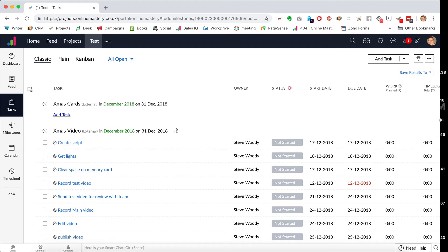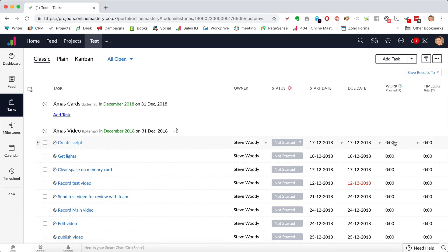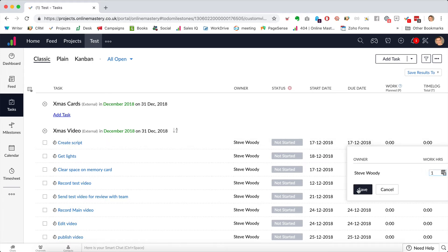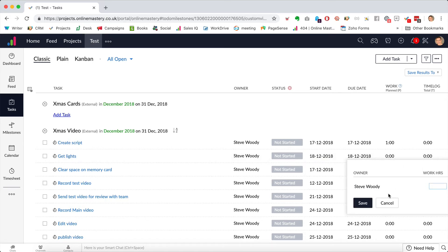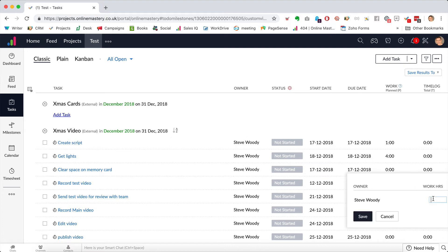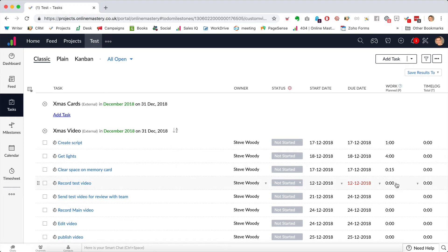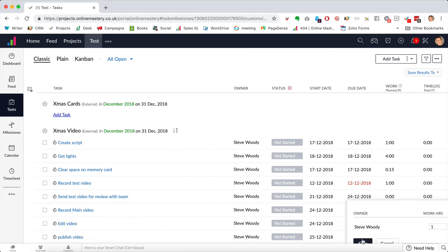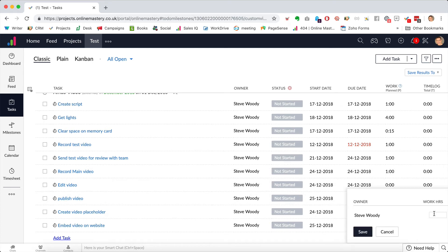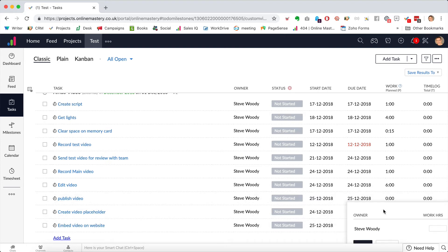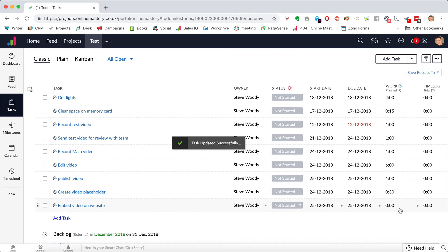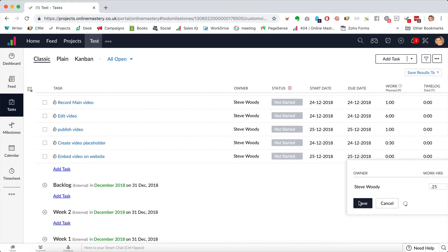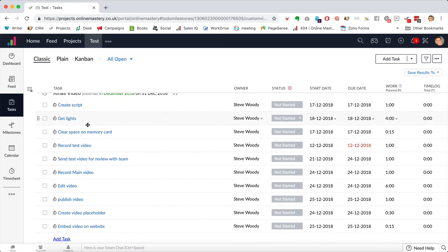I can now plan how much time each task will take: creating the script — one hour; getting the lights — four hours; clearing the memory card — 15 minutes; recording the test video — one hour; sending it for review — one hour; recording the main video — one hour; editing the video — six hours; publishing — one hour; creating a placeholder — half an hour; embedding on the website — 15 minutes. I've now planned the total time for this entire section.